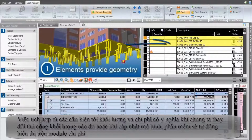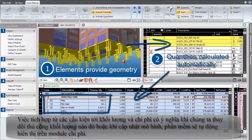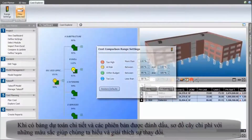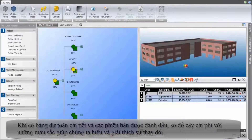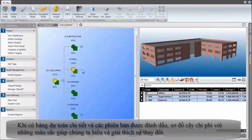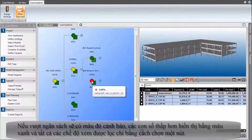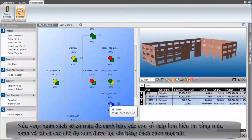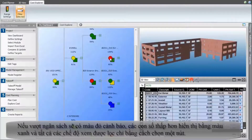We can reference quantities from our consolidated takeoff to complement the cost plan where necessary. The element-to-quantity-to-cost integration means that a manual change to the takeoff or an updated model will inform the cost plan automatically. As the cost plan develops and versions are marked, the stoplight colored cost explorer tree helps us understand and explain the change — warning of over budget in red and suspiciously low numbers in blue. All views are filtered just by selecting a node.